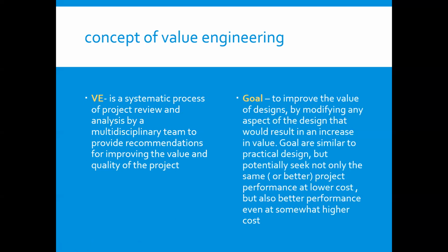Goal: to improve the value of design by modifying any aspects of the design that would result in an increase in value. Goals are similar to practical design, but potentially seek not only the same or better project performance at lower cost, but also better performance even at somewhat higher cost.